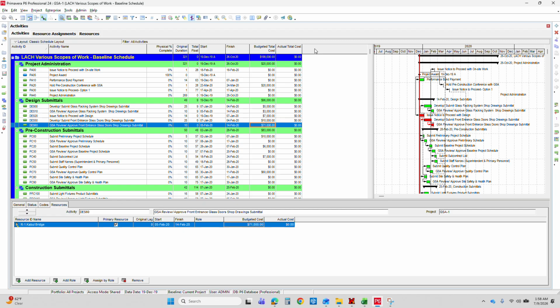The actual total cost, in other words, is achieved through the production and completion of each activity. So upon completing your activities, let's say you completed 20%, 10%, 15%, or 100%, and how much actual cost you accrued to those activities. That is how you update the actual cost.